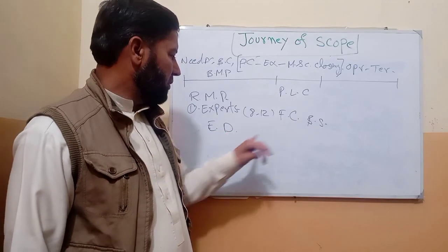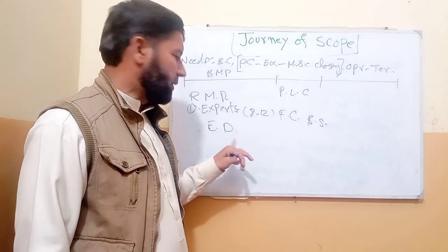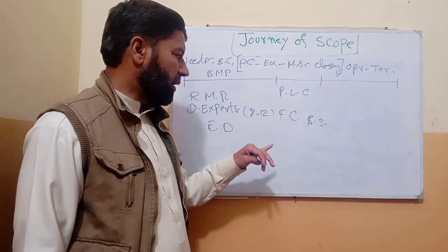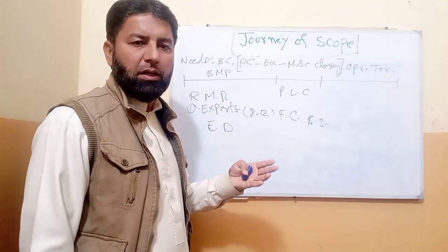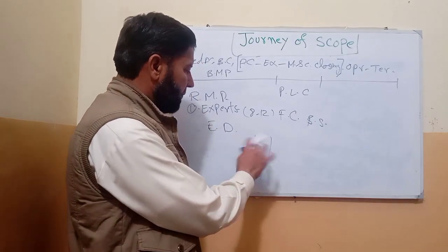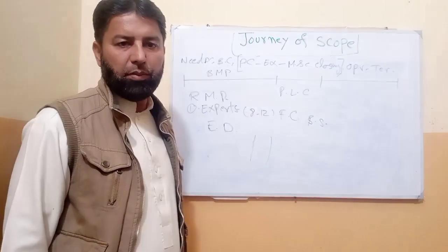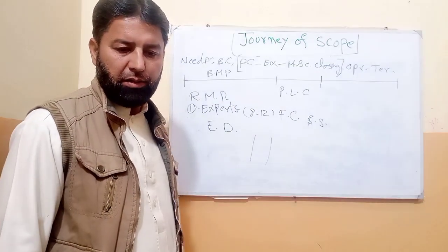We classify those ideas in an affinity diagram. We take sticky notes and put the ideas randomly, with no ordering. Under one heading or two headings, we separate those requirements or ideas.